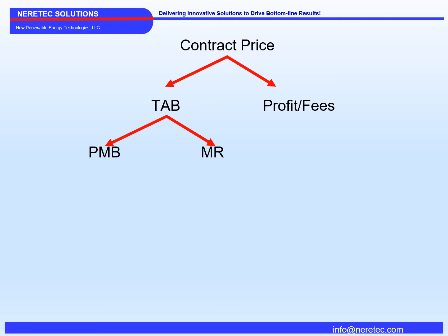The second component of the total allocated budget is the performance measurement baseline. The performance measurement baseline is the time-phased budget plan. This is what you use for your earned value management. That's what you're going to be measured against. You will have your time-phased resource plan. You will have your time-phased activities to go with this time-phased budget plan. This is called performance measurement baseline.